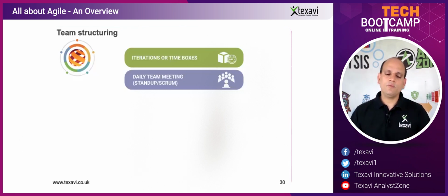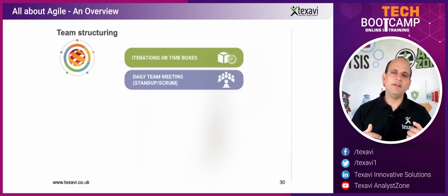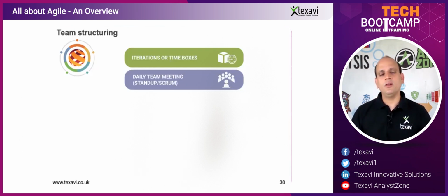And then what we discuss in that one is that we would give an update. Each of us would be like a round table. So each of us has got a turn to update the entire team so they know what we're up to. So I would say what I did yesterday. I would say what I have been working on today, or what I'm going to deliver by the end of today or tomorrow. And then I would also say if I have got any problems, any impediments, any hurdles that I have that is stopping me from my work, basically, any blockers is what we call. So I will explain all of this. I'll put forward all of these in the team meeting. So all the other team members know what I'm up to.